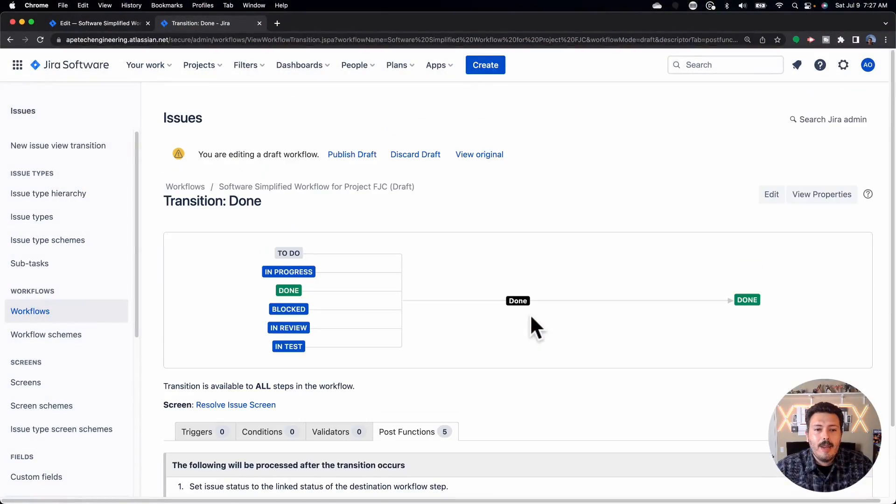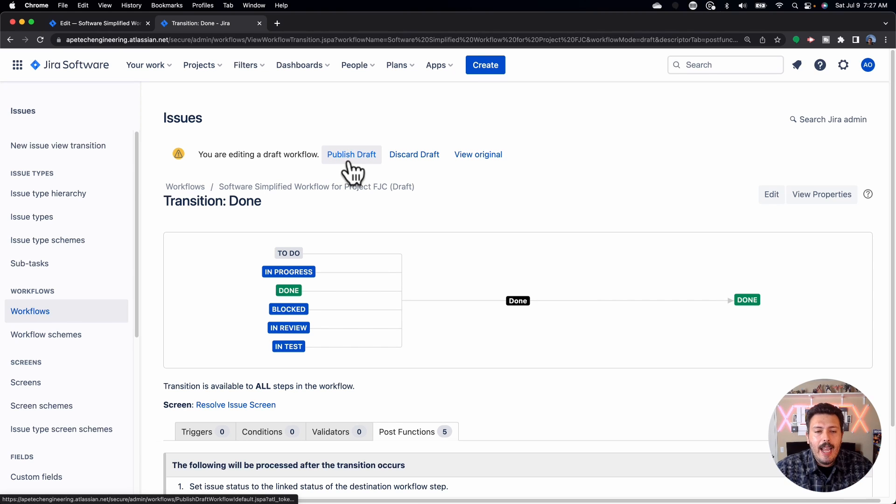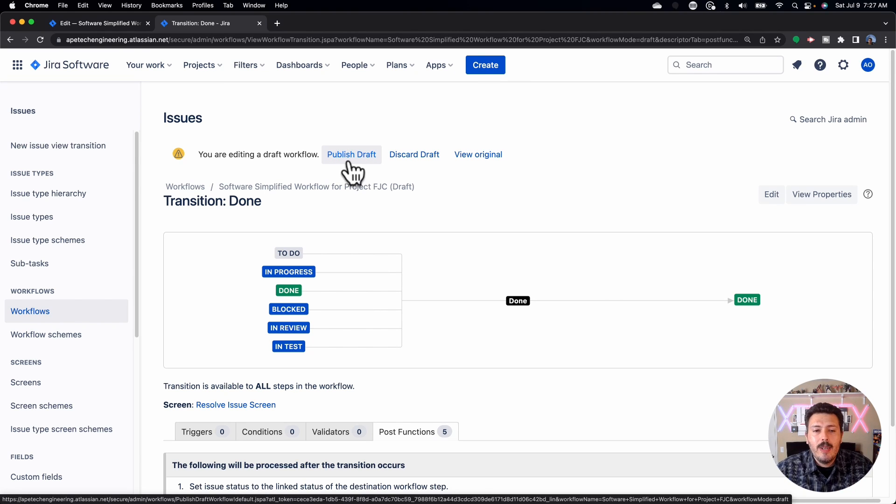So you have two options: either put in that post function so that it always goes to Done, or add the Resolve Issue screen to the transition so that the user is forced to set a resolution. I also recommend you make the resolution field required at that point — because if someone moves an issue to done without selecting from the drop-down, your issue is still not going to be resolved. Let's go take a look at what this looks like back in Jira after I've removed the post function and set that resolution screen on the transition.